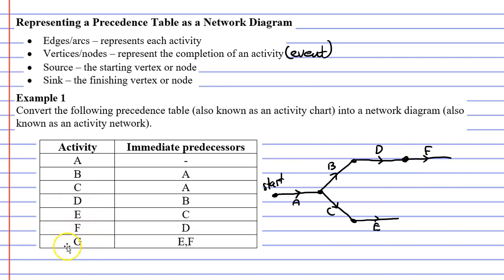We're now going to look at activity G. You might see that activity G comes after activities E and F, and we're faced with a bit of an issue here. I'm going to do it in red because this is going to be wrong. If it comes after F, I need to finish F and have an edge labeled as G.